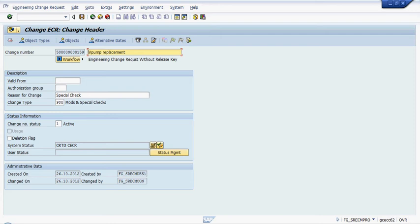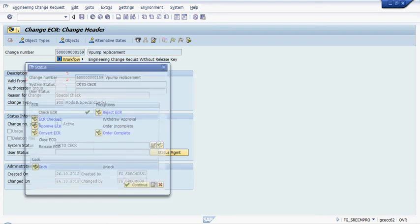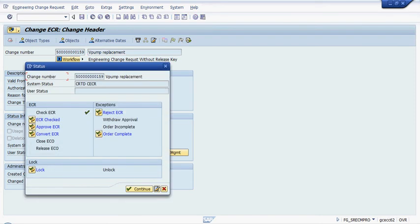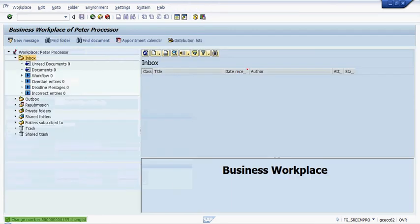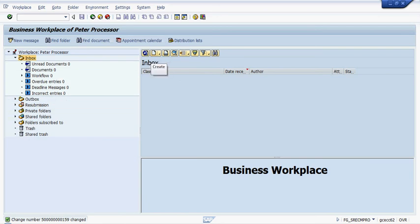What will happen now is because it's complete I can actually now go in and I can click order complete, continue and save and the entire workflow process is now completed and the engineering change request is effectively closed.